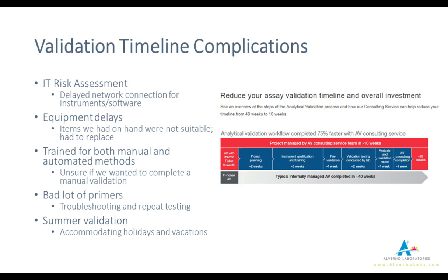Nothing goes as smoothly as we would hope, and next-gen sequencing was no exception — we certainly had our complications. Our IT risk assessment process is very cumbersome, timely, and frustrating because it's out of the responsibility of the laboratory. We can bounce information back and forth between the vendor and our IT, but ultimately there's nothing we can do outside of the bench work. Trying to do the training was often difficult because we could have the software in the laboratory but weren't allowed to connect it to the building's internet, so it was difficult to do training using e-data on our own instruments. We actually had to do some training with data stored in the Thermo Fisher cloud.